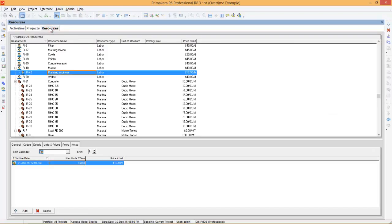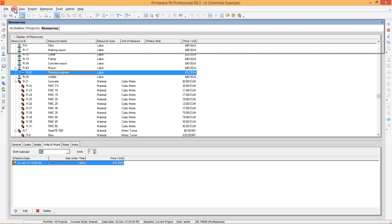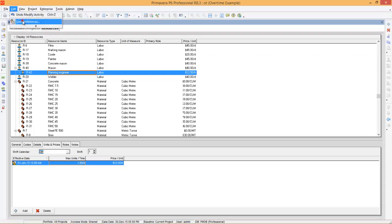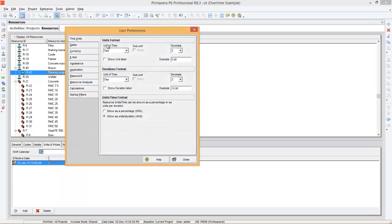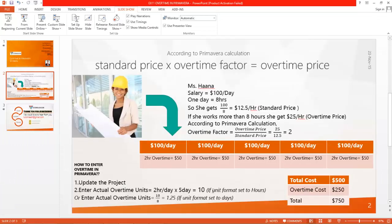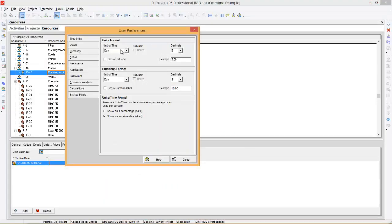Now we will go to resource. Before you create the resource Miss Hanna, you need to check user preferences. Go to Edit, User Preferences, and set the unit format. If unit format is set to hours you need to enter 10; if set to days you need to enter 1.25 according to our calculations. Here I'm going to change unit format to hours — then afterwards we will change it to days. Then close it.